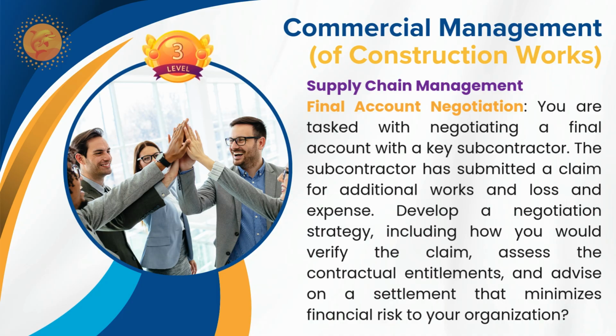The subcontractor has very limited exposure, which is with respect to his portion of the works, his scope of works. Based on that value, his delay damages and other losses would be associated with him. But for the contractors, the quantum of loss would be much higher than the subcontractors.